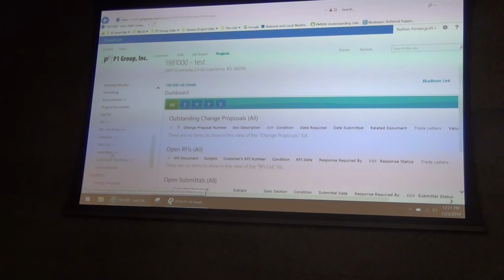Yes. And the biggest benefit, like I said, is that the markups you previously put on the drawing rise to the surface. Because before, we were manually inserting the new one on top, and then we lost all the RFI designations and links to submittals and everything else we had. Do you have a handout that you went through those steps? We've created one. Can you email us the batch process? I'll do that later.